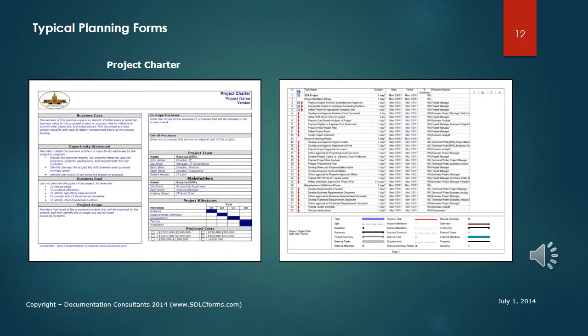The project plan depicts the assigned task, duration of the task, completion percentage of each task, any predecessors required for completion before that task can be accomplished, the resource name, and other attributes. This data that is normally updated on a frequent basis becomes the foundation for periodic status reports to IT management, collaborating organizations, and especially the business sponsors and business units.